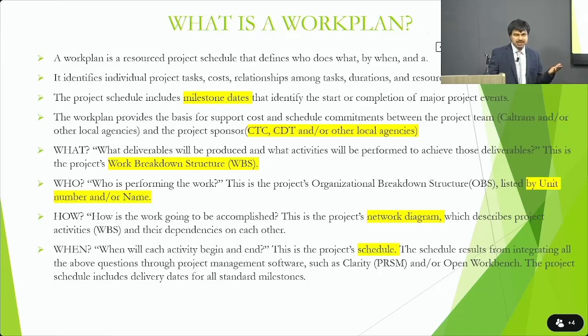If it's a design function, all the functional unit managers, along with the project manager, we're all responsible for developing the work plan. And then how? So once you know that you want to do a project, which is building a bridge or design bridge or culvert or TMS element, whatever the scope of the project is, you break the work into, let's say, 100 different pieces. You have to connect them, which sequence you're going to follow. That's what the network diagram refers to.